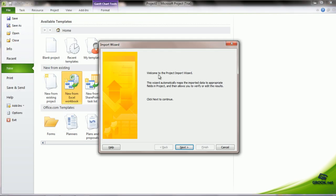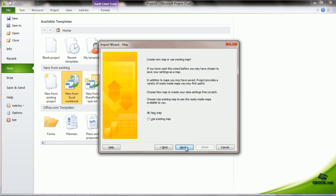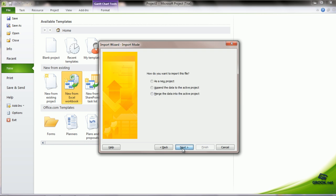It opens the project import wizard, so we click Next. It asks whether we want to create a new map or use an existing map. Since we are creating a new one, we say New map and click Next. If we choose as a new project, it forms a new project. If we say Append the data to an active project, then it adds the list to the currently active project or it can merge the data into an active project. Since we are starting a new project, we will choose as a new project and click Next.